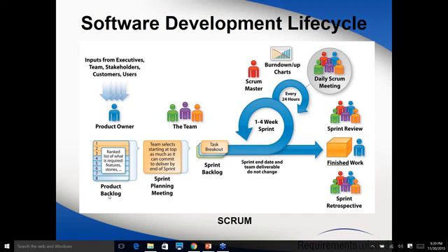So assuming I'm a business analyst working with the product owner, maybe after 1 month of product backlog grooming sessions, I have a list of requirements in my backlog which can be picked by the sprint team to start developing, because the requirements are done in this phase. When I say complete, it doesn't mean I'm done with all the requirements. My requirements are constantly coming, but I may be done with, let's suppose, 10 user stories ready for development. Maybe the remaining 50 are still not complete.